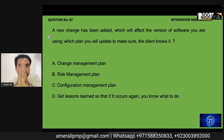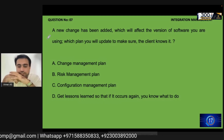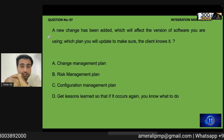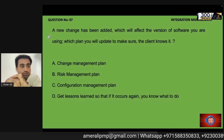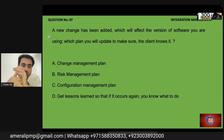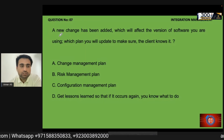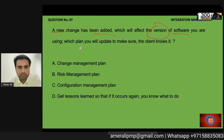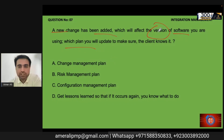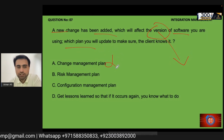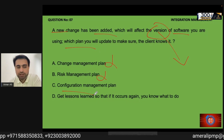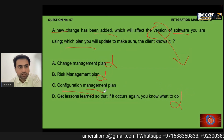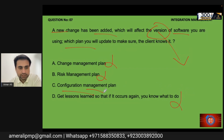This question tests the difference between change management plan and configuration management plan. A new change has been added which will affect the version of the software being used. Which plan will you update? Since the version of the product is affected, the configuration management plan is the correct answer — not the change management plan and not the risk register. Option C, configuration management plan, is correct.